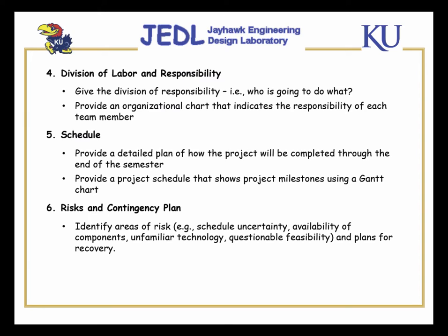Things will be broken down in finer detail when we get into the critical design review. But first of all, and most importantly, make the Gantt chart readable. Make it readable in the report, make it readable on the slides, and keep out the minute details of tasks that need to be accomplished. Look at the big picture here and provide an overview of who's doing what, when, and that's really number 4. And in number 5, you list the activities that need to be accomplished by a particular time,